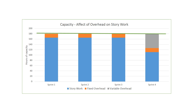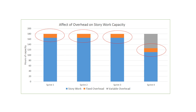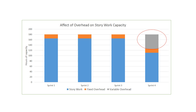This chart shows how the three types of work can affect your capacity. The green line shows the maximum capacity for the team. The areas of the bar in orange represent the fixed overhead that affects every sprint to about the same extent, allowing for consistent capacity for work on the product. The blue bar represents the story work, showing how much work is being done on the product. The gray area represents variable overhead, which directly affects the height of the blue bar.